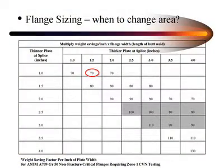There's a chart in the document that gives you some instruction. Basically, you just look at the thicker material on the top axis and the thinner material on the bottom axis, and find out where they intersect. You'll find a number there. You multiply that number times the width of the flange, and that tells you how many pounds you have to save to rationalize making the splice and cutting it and welding it and so on and so forth.